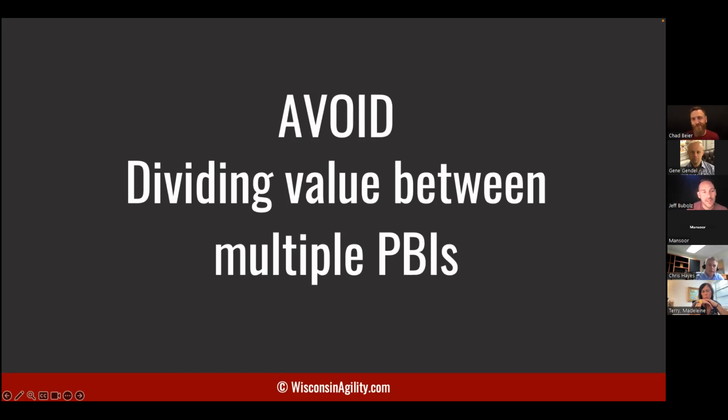Think about it as a risk container. Think about what can we validate? What can we prove within this time box towards this outcome or this impact for the organization? A telltale sign that maybe you're doing this is if no one wants to come to your sprint review. If stakeholders are paying a lot of money for your sprints and they're not coming to your sprint reviews, you're probably slicing past the point of value and you're just showing them work in progress.